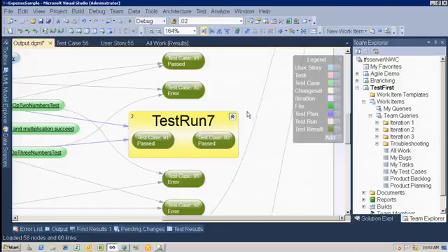How many of you have developers give code to testers, and testers have never tested it, developers have never seen the test cases, and it comes back? How many of you have a 50% failure rate first time through? Fair number of people, and that's actually low for some shops. This process takes a little bit more work up front, and it reduces that number drastically. Just a little bit of work can reduce that number to almost zero, because if a developer's already run the test case, there's really no reason why a tester should ever see it fail.